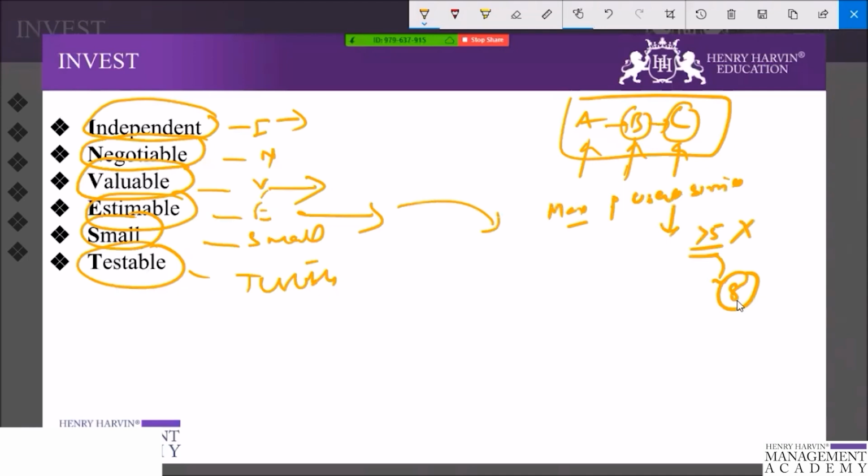So I made a sort of rule, though we don't like to call it a rule. But when the team started breaking down user stories that were more than 5 story points, they understood that a big chunk of story is difficult to be done within the sprint, and it even adds more complexity rather than ease.